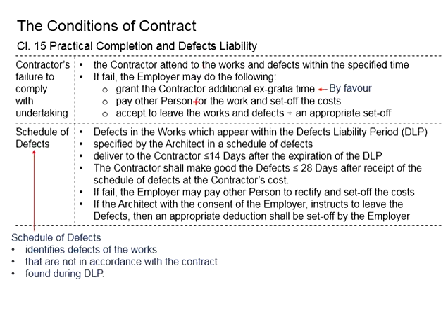Or the employer can accept the defect without rectification, but the relevant cost will need to be offset from the payments to the contractor. Whichever defects are identified during the defect liability period will be fully the responsibility of the contractor, no matter which option the employer chooses. The relevant cost will be fully paid by the contractor. This will ensure the contractor carries out the works carefully and delivers quality works.